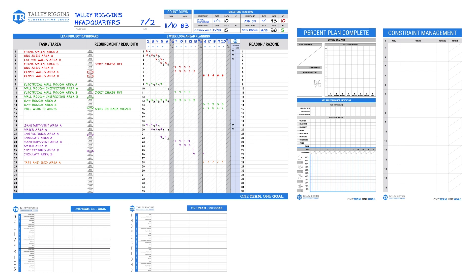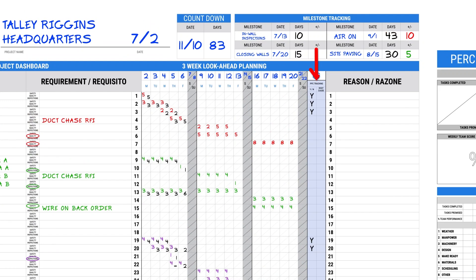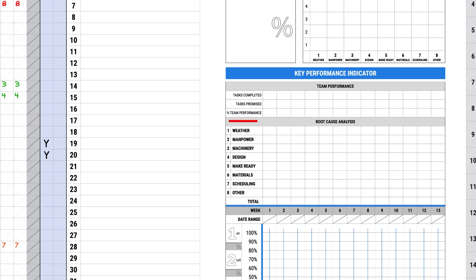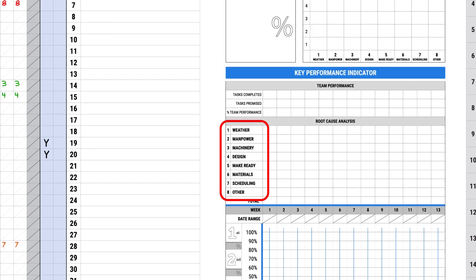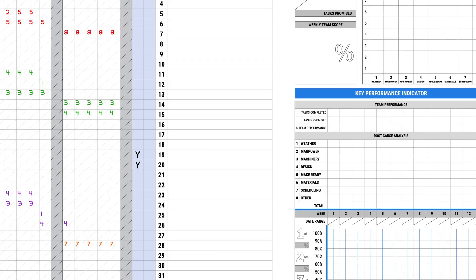Friday's huddle is somewhat different than the rest of the week. During this huddle, you will score the week's performance for completed tasks. Any tasks not completed as promised will have a root cause assigned with the reason written in the column next to it. It is important to the process that the team is both honest and thorough in the understanding of the root cause and reasoning so the team can accurately address problems in the future.